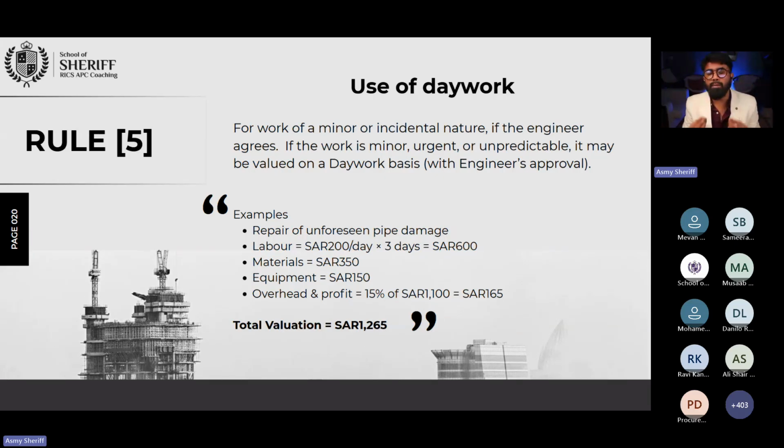One example: my work is construction of a house. Think about it in a very simple manner. In the BOQ, I mentioned everything. And also below, the employer requested me to provide the day work schedule: skilled labor, how much per day; non-skilled labor, how much per day; your breaker, how much per day; your so-and-so thing, how much per day. He requested, you gave the rate.